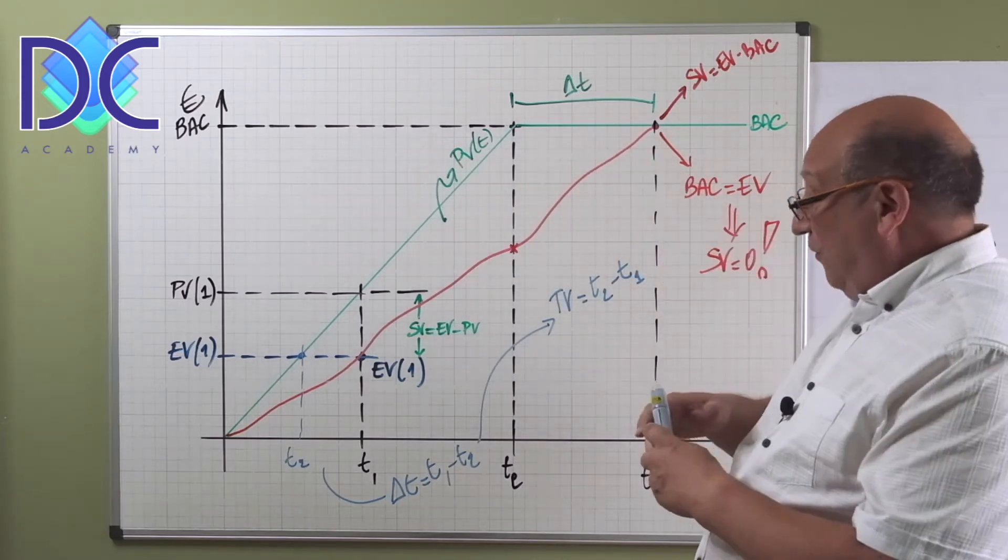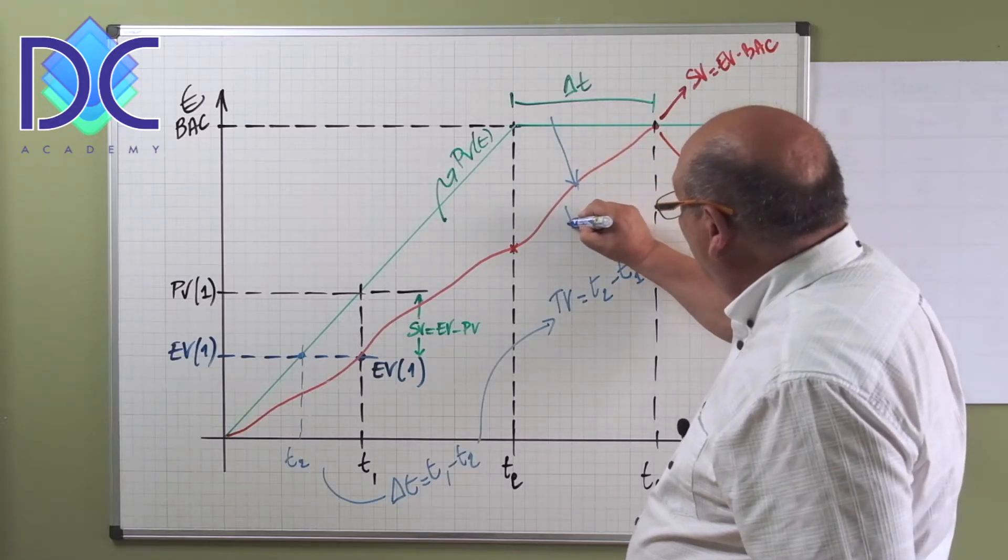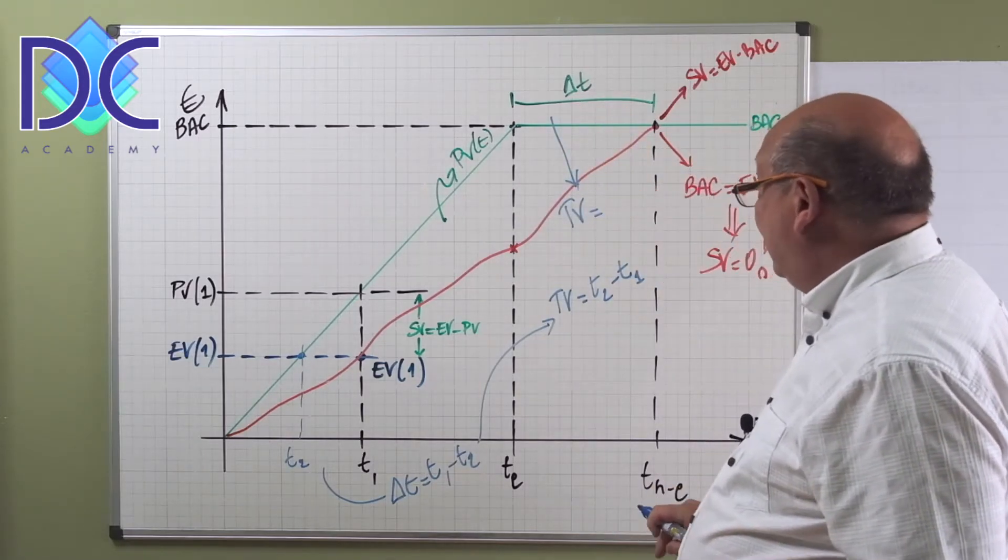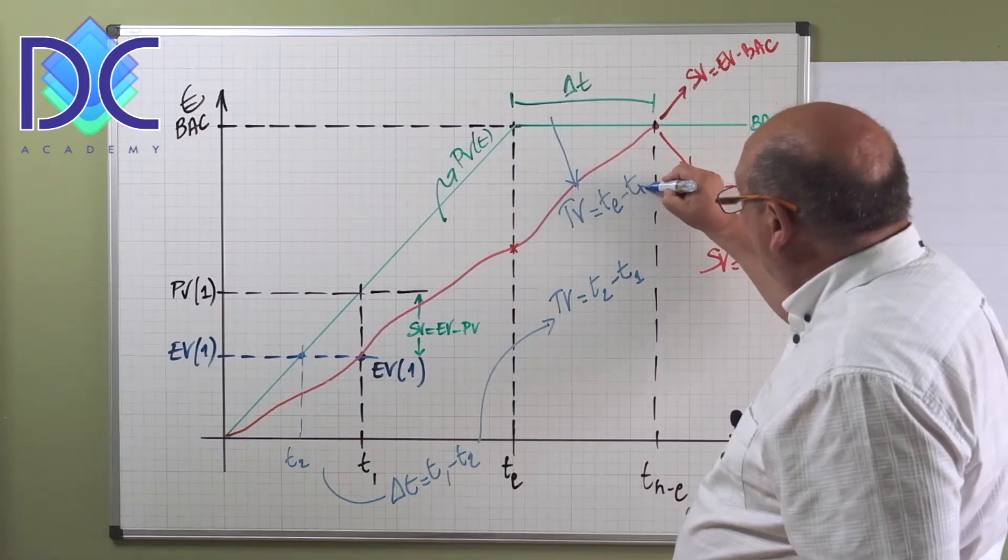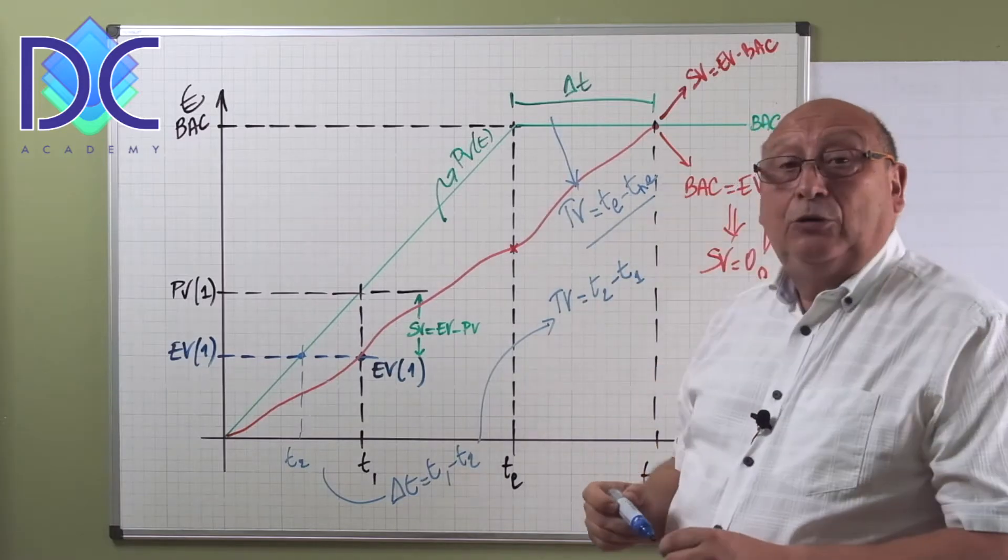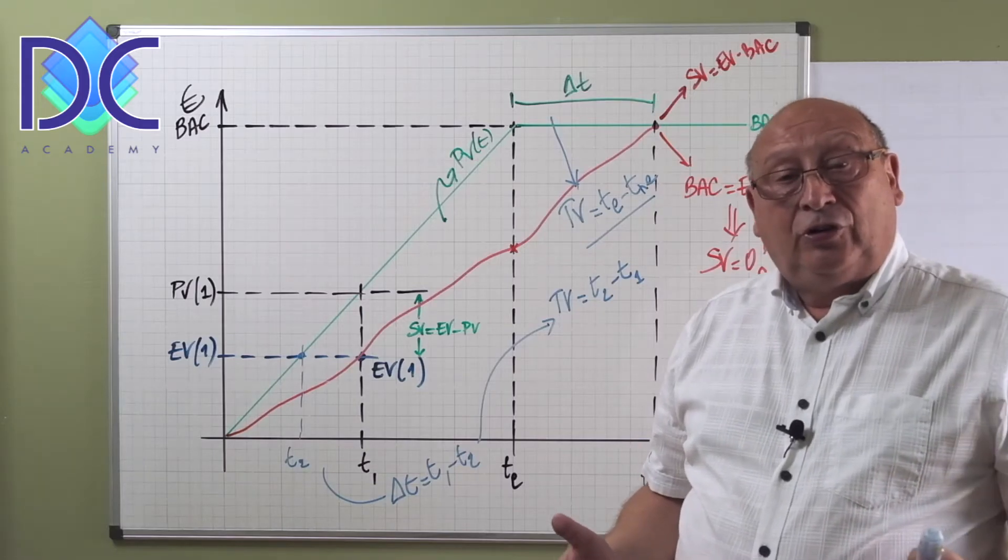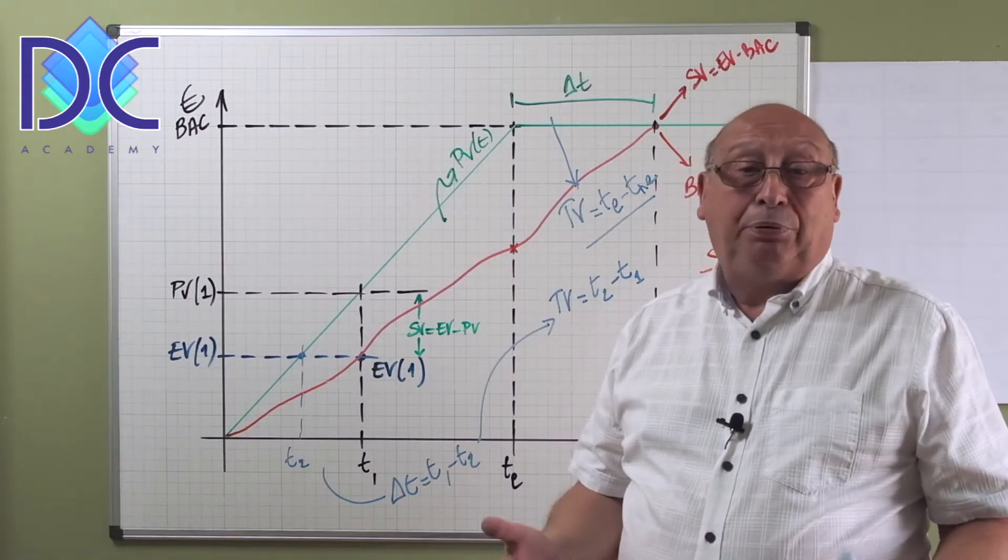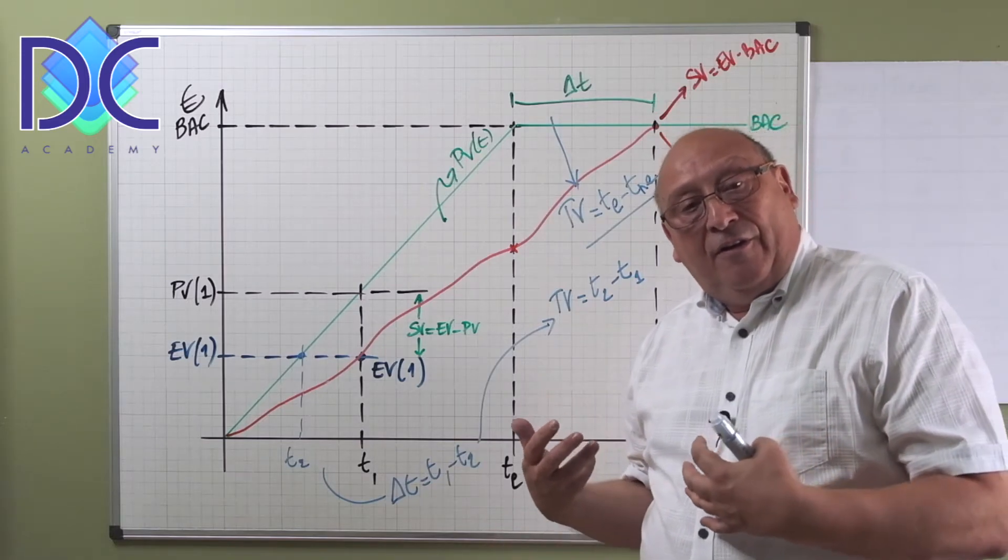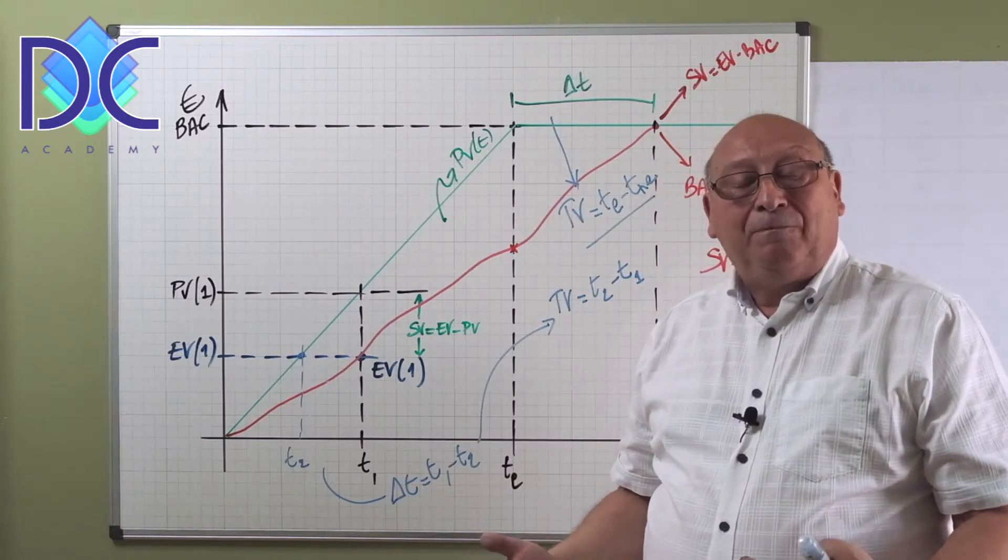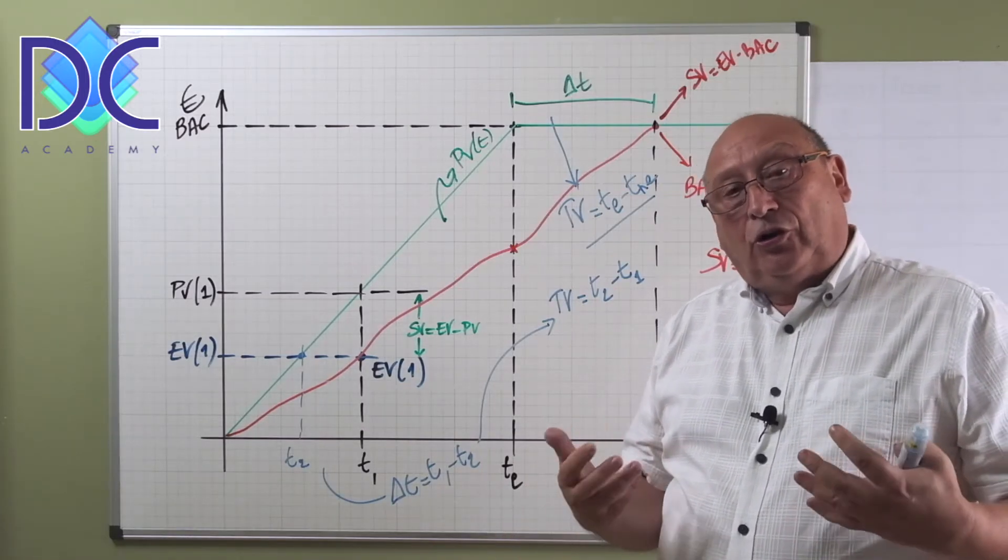And when we continue, we see that that time difference keeps on growing, and we find that the time variance is basically t the new end minus t new end, which is not equal to zero anymore. So basically this method shows us a more realistic approach on how to use the earned value.